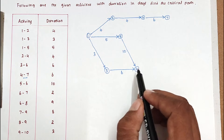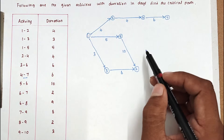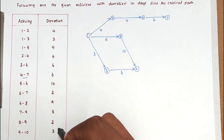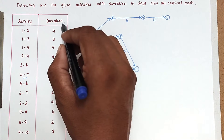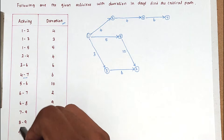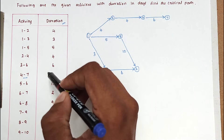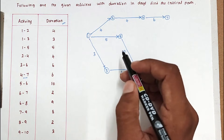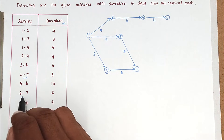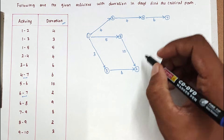We need to keep in mind that arrows should be in the forward direction, not the backward direction — drawing an arrow backward would be wrong. There are no dummy activities here, since dummy activities have zero duration. Dummy activities are only used when required based on precedence relationships. Next, activity 6-7 has duration 2.